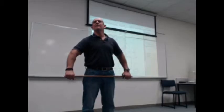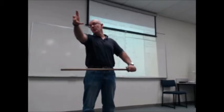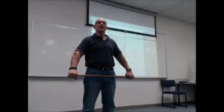Shut up. Eric, you're going to hate me, but I want to know what we pay a tiler per square meter. Tiler, allow. For that house here, it's a standard house, allow $40 a square meter. Normal rate is what we allowed, including his grout and supplies. $40. And what about if you're doing a tricky area?